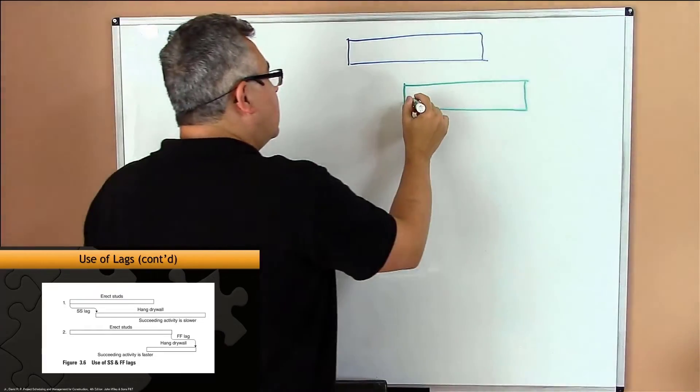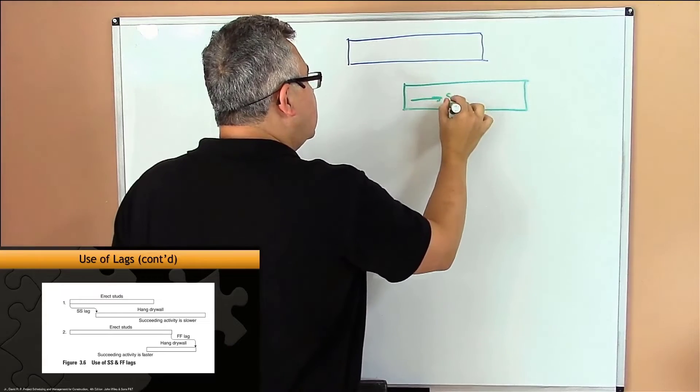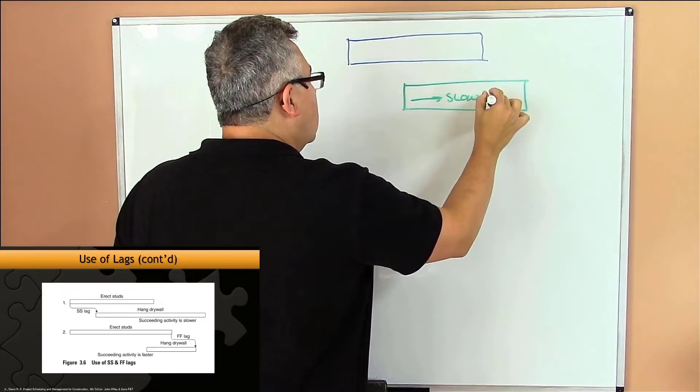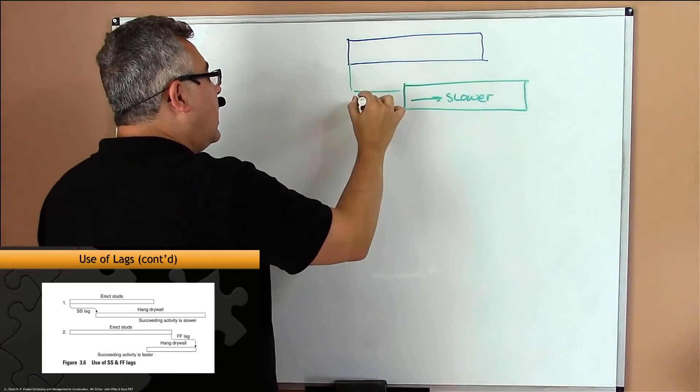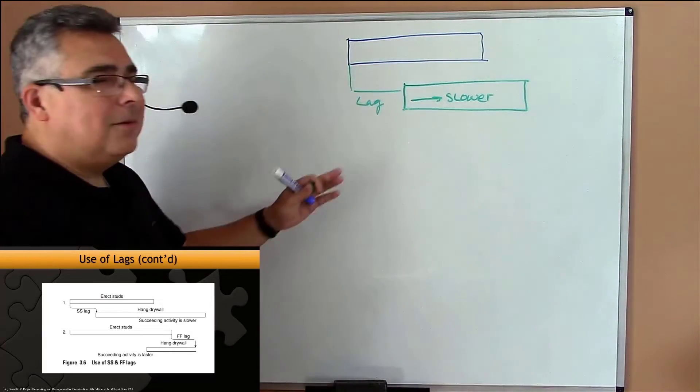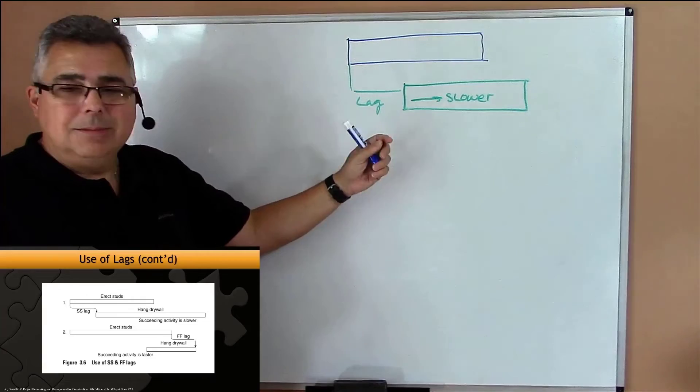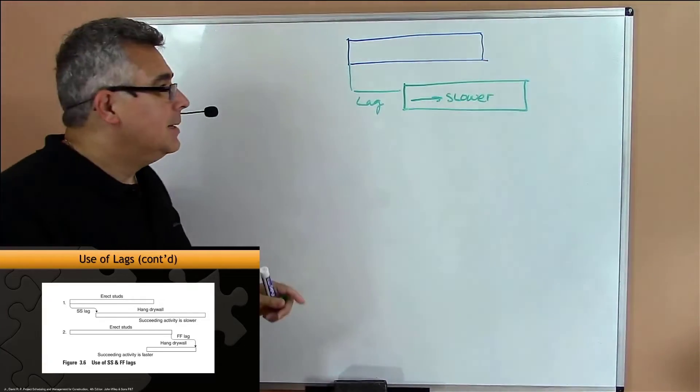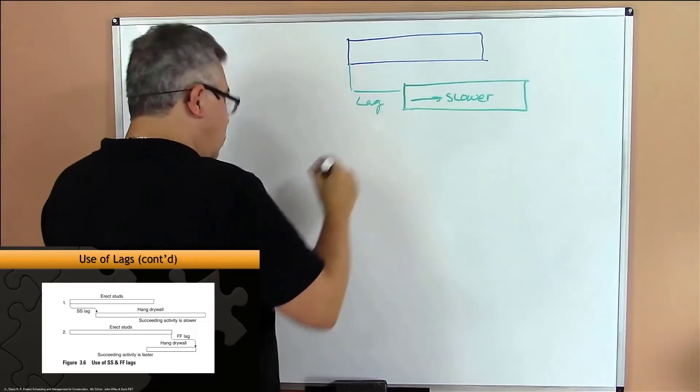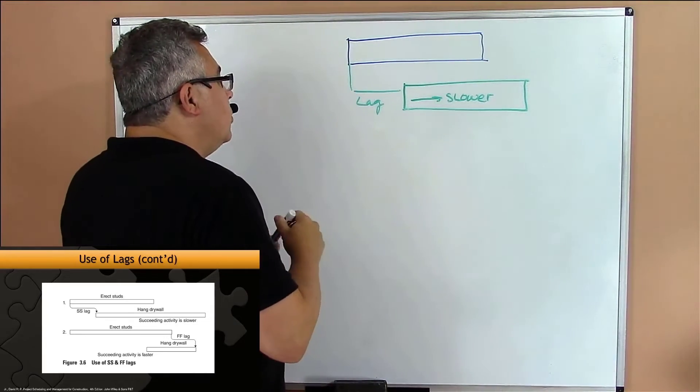If green is slower than blue, if you put a lag at the beginning, you know that that activity, no matter what, will finish after the first one. But if I have a situation in which the second activity is faster - faster - that is very problematic.